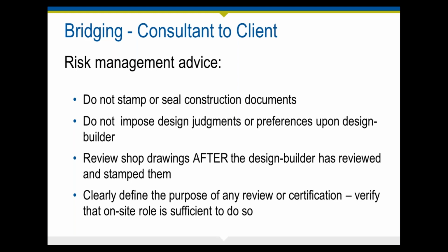The nature, purpose, and extent of your review of any design or construction document or other work product of the design builder should be carefully and clearly defined in your agreement with the client. Under no circumstances, really, should you as an independent design professional stamp or seal the construction documents prepared by the design builder because they were prepared under the supervision of somebody else.